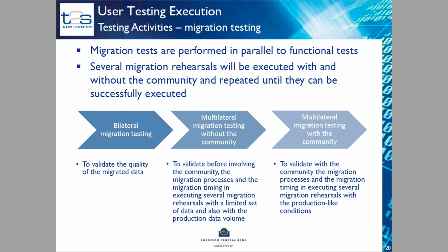Okay, these are the official testing stages, where we have the synchronization points linked from the program plan and so on. But in parallel to that, and in addition to these testing stages, we also have the migration testing. So we intend to run several migration rehearsals, and we have agreed in the user testing subgroup that the migration testing will be in phases. And we will phase them in a way that we start with the bilateral migration testing.